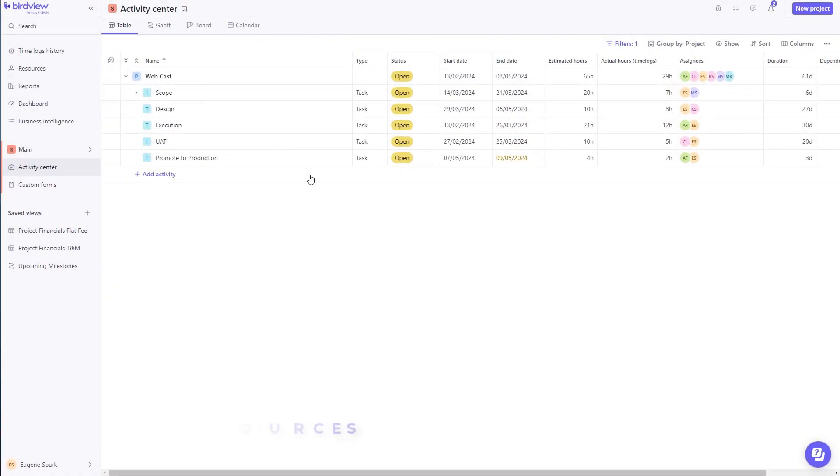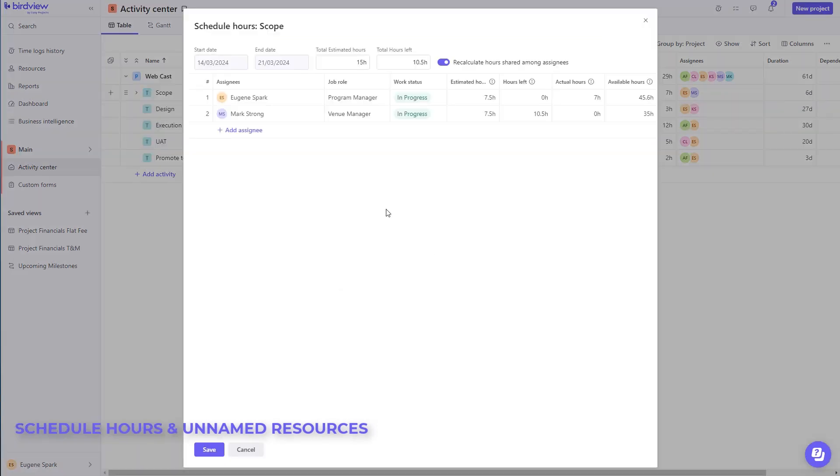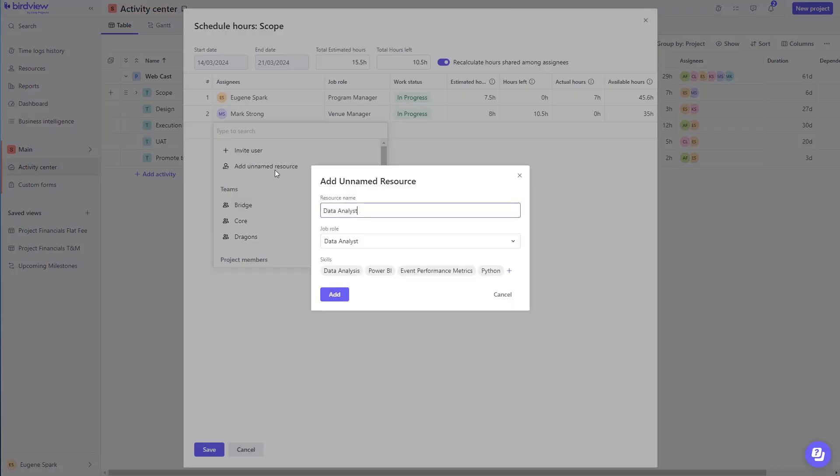At each task level, you can establish the estimated effort, schedule those hours to a specific resource, so that resource can easily track their time against the estimated or the scheduled effort.